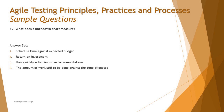Question 19 asks: what does a burndown chart measure? We have been discussing different attributes of agile methodology, including how to provide status updates. One of them is the burndown chart, which talks about the ongoing progress. In simple words, it gives you at any point in time the amount of work remaining to be done in a particular sprint.